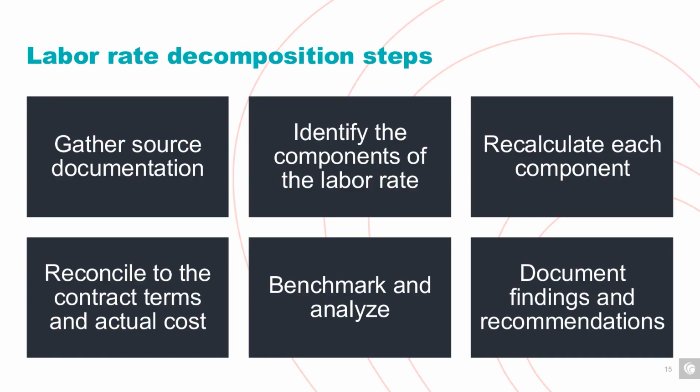For benefits and other burdens, you're going to want to request support from the contractor to determine how they arrived at your hourly rate. And you're looking to verify the rate appears reasonable based on the support provided and that you can arrive at the rate proposed by your contractor.